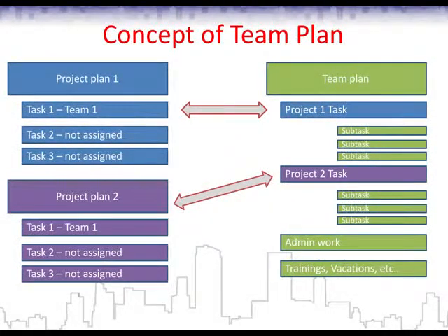But then the team manager should have the opportunity to drill this down, define activities, sequence them, assign his resources, do some leveling, play with these subtasks, and assign them in the most convenient and proper way he sees.